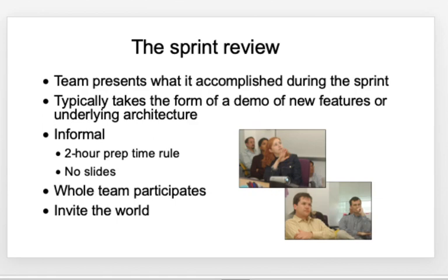So if you look into the sprint review, it almost resembles a project review that might be happening in your final year of the BTech. The team will present what is accomplished during the sprint, and typically it should be in the form of a demo.